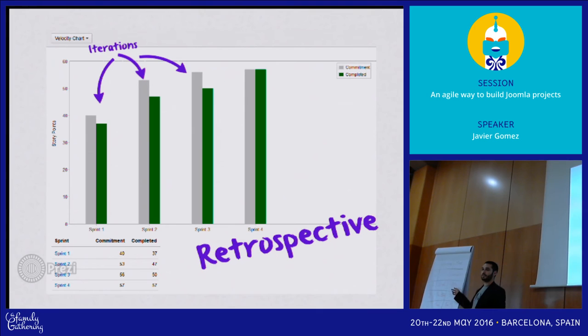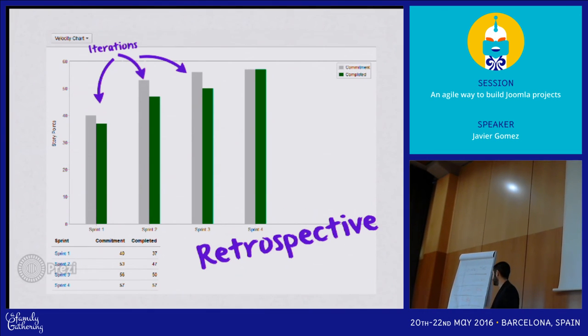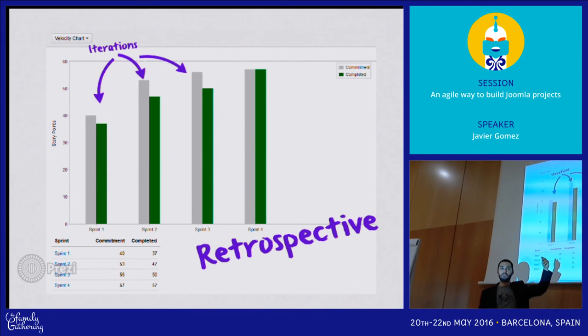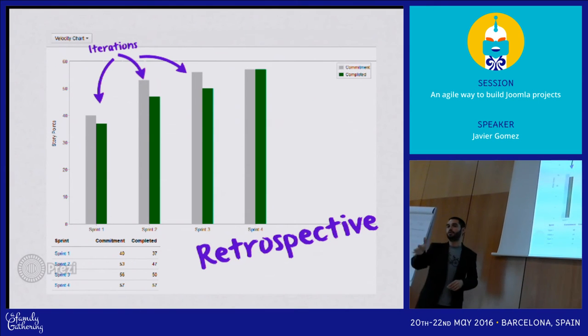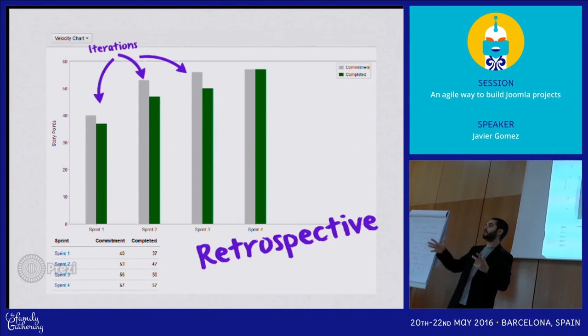So this is also not good. I mean, if the people have nothing to do in this 1 minute and a half, it's also a bad estimation. We failed again here. And finally, we more or less did it. We estimated 1 minute, it took us 1 minute and 9 seconds. So that was a good estimation. Because now, thanks to the iterations of estimating again and again, I know that you, the team, are able to do more or less 10 points on each sprint.